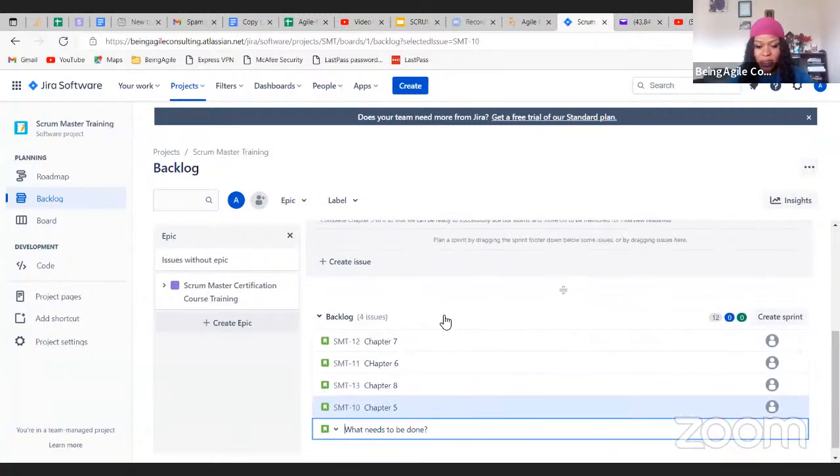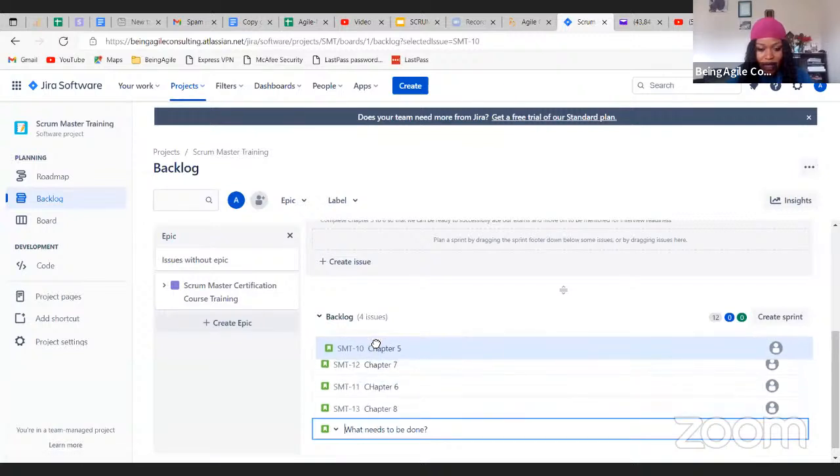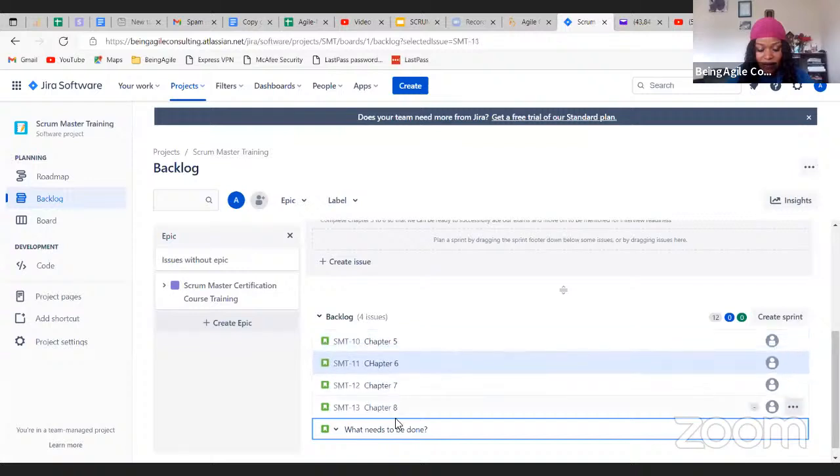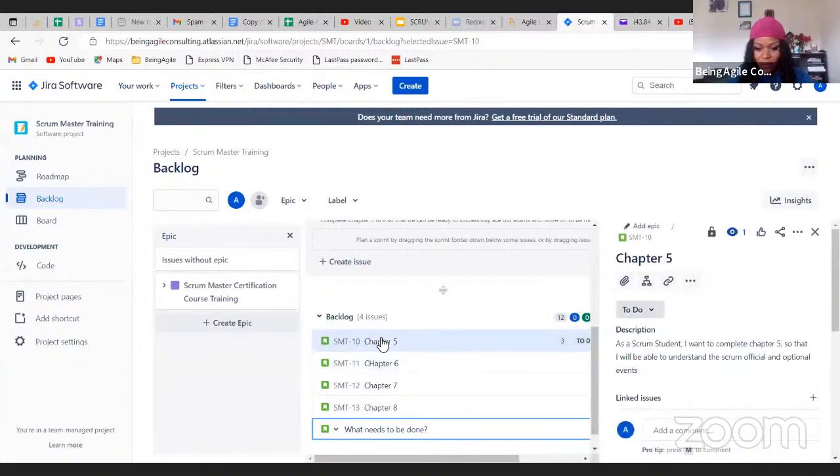So in a standard sprint backlog refinement session or sprint planning, assuming that this product backlog is prioritized, in our case, we should have 5, 6, 7, 8. That's the order. And we'll be discussing from number 1. Open it, have a conversation, estimate it, all of the necessary information.